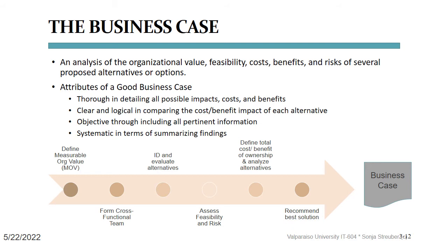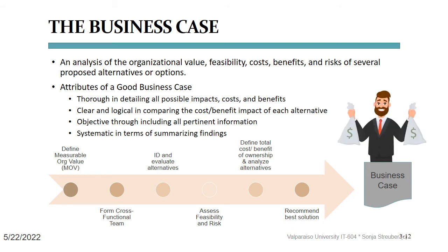A well-written business case gives the CEO or whoever decides which projects the company is going to undertake a good sense of the financial benefits and the costs of a project. It compares different ways of achieving the project goal, usually an inexpensive solution leading to a minimum viable product, a medium cost version that gives the CEO a bit more project outcome, and then the full scope, which is scalable for the future.